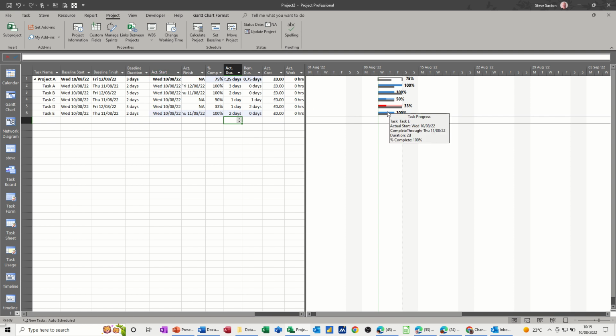So let's say that's happened. What you need to do now is, there's been a delay for some reason. If it's a building site, there's been heavy rain or snow and you can't work, so everything's stopped and it's moved forward a week or so. Let's say you're starting work again on the 22nd of August. So I don't want to be manually moving all these tasks that have still got work to be done, which is these two. I don't want to manually move those forward. I want the computer to do it, but I need to tell it where to go to.